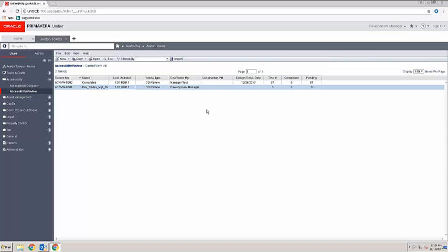So that is the intent. When we forward the items that the accessibility consultant cited over to the architect or other design consultants, right now we're forwarding everything over to them, and we're just expecting them to go through every line item and address any that are design related. So we're not calling out which ones are design related, but we're basically putting it on the architect to identify which ones are design related for them to address.